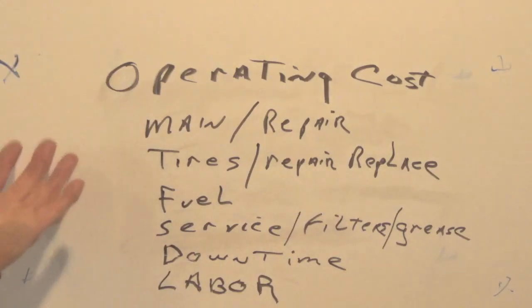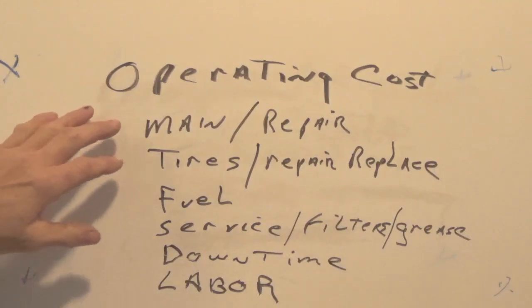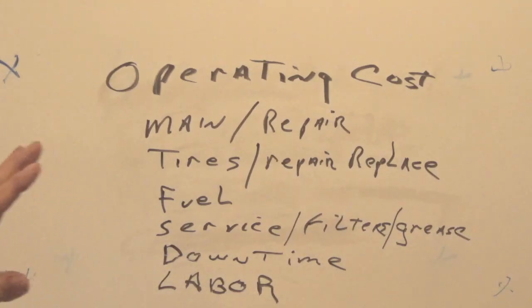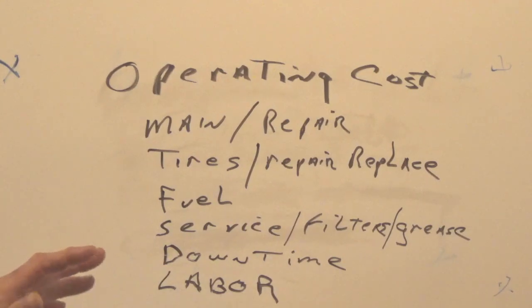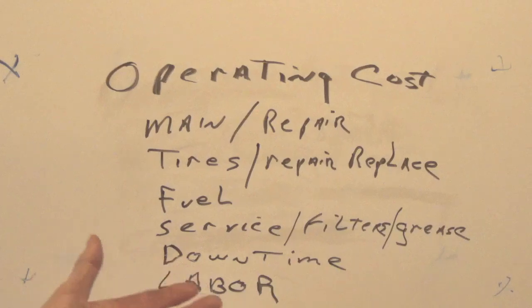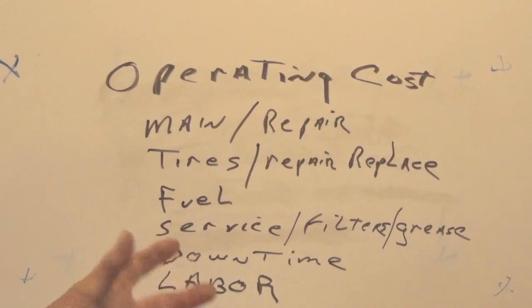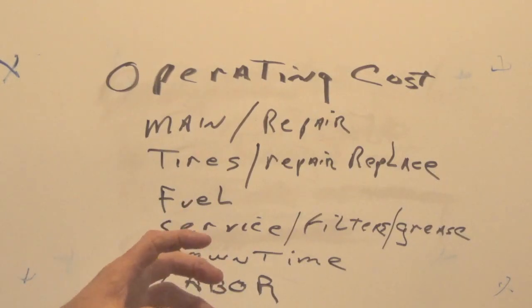Now, on the opposite end of the spectrum, in a bigger thing, if you're running heavy equipment, say you're grading with a bulldozer, obviously the blade, cutting edges and tracks on a bulldozer grading topsoil are going to last a whole lot longer than on one grading conglomerate, which is a rock that's been pasted together over time and very hard.